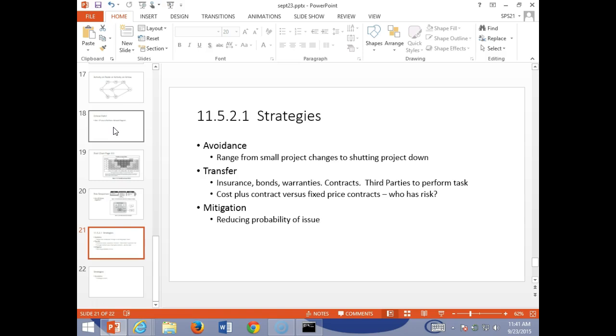You see a lot of different companies. We transfer risk, so tasks that we don't know how to do very well maybe. Maybe we're not really good at laying storm drains, and we don't want to take that risk of the town flooding. We hire a company that specializes. Or we don't know how to do tunnels, or whatever it is in construction, or we're a web design firm and we don't know how to do database development. We put that to somebody else.